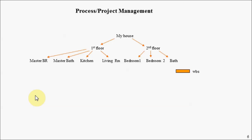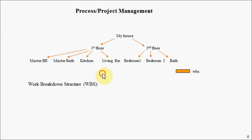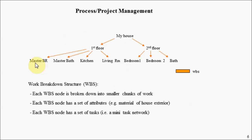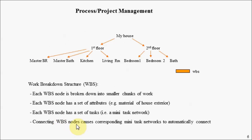Let's look at how to apply the TCSQL capabilities toward developing a process/project management application. Imagine we have a house that we want to build, broken down into first floor and second floor, broken down into various rooms. We're going to utilize the notion of a work breakdown structure, where each node is broken down into smaller chunks of work. At each level of abstraction, there are attributes — a collection of tasks that must be accomplished with a temporal relationship between them — forming a mini task network for each level.